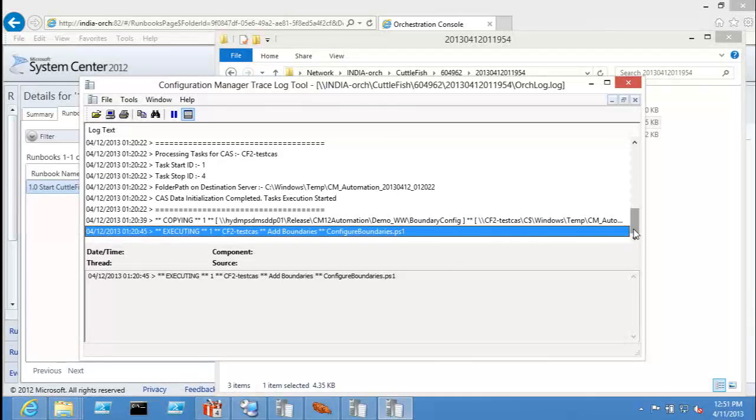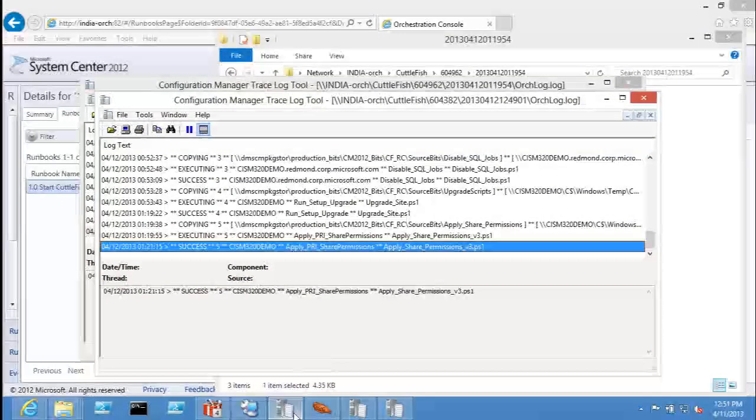Well, it is true that the work we have done is very complex and a lot of work, but the complexity is not in the runbook, it's in the scripts. The runbook is simple, it's just telling what needs to be done, and it's the XML. That would probably not take a week to come up with. What could take months is developing the scripts if you have never done it, because you have always done the work manually, and need to think about where this setting is to be changed and what type of script to use. That is something we made simple.